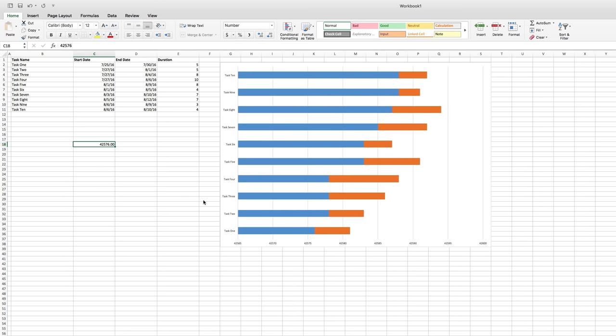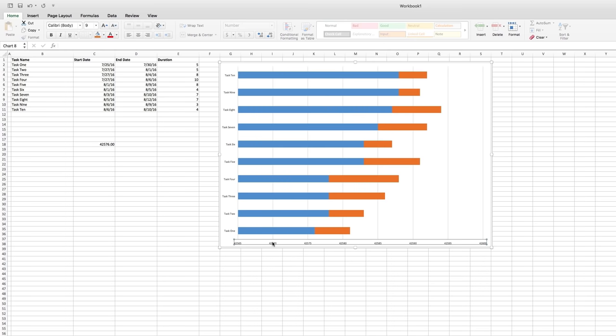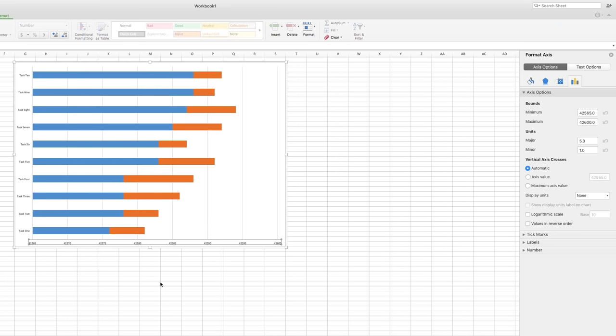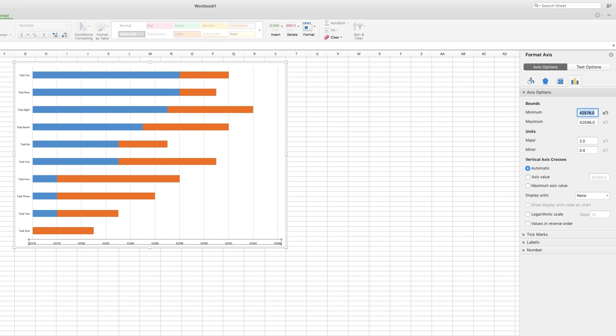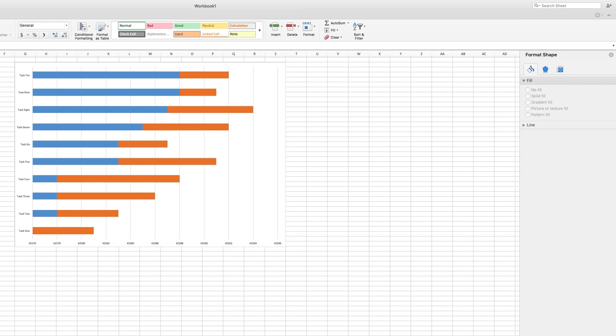Now highlight the Horizontal Axis, right click and select Format Axis. Under Bounds there are fields for Minimum and Maximum. These are the first and last dates in the chart. If we change the Minimum value to 42576.00 and hit Enter, all that extra time will disappear from the beginning of our chart.